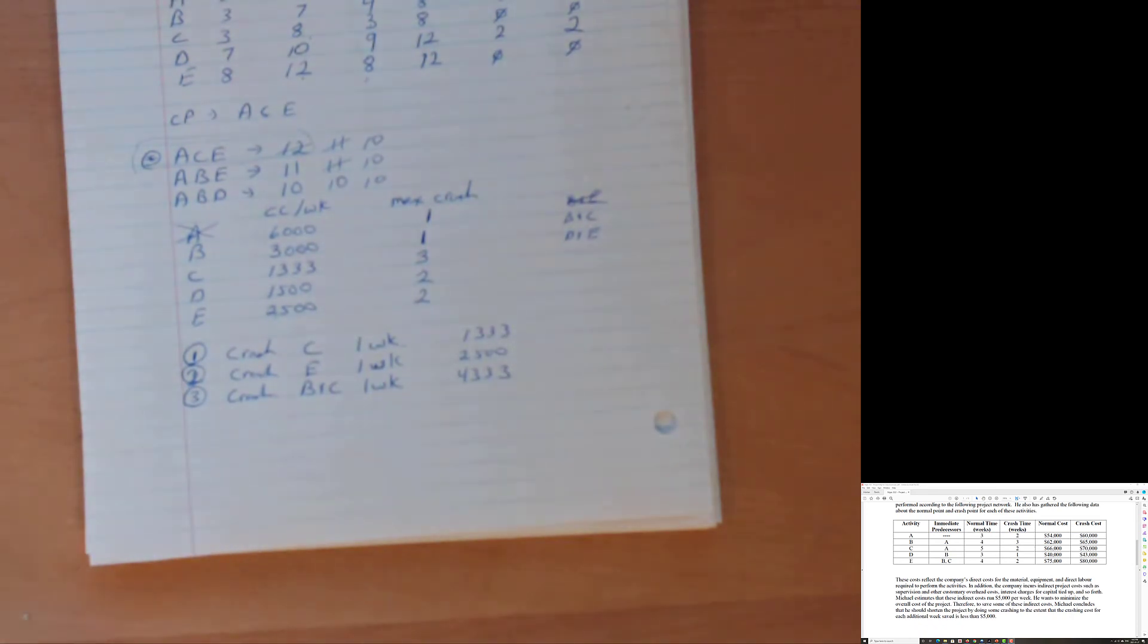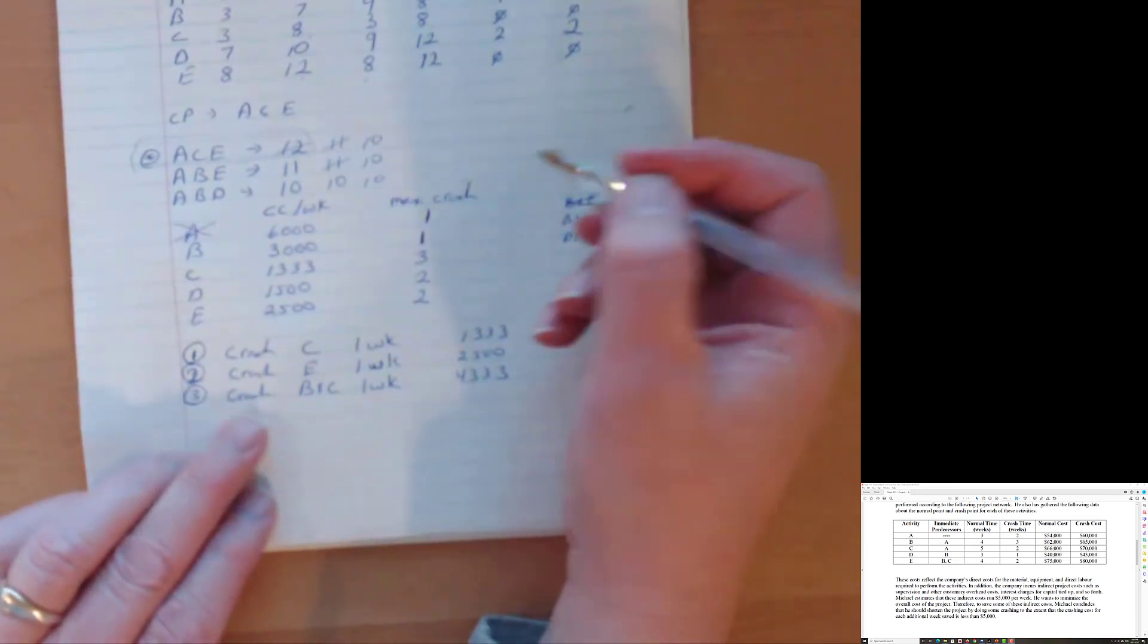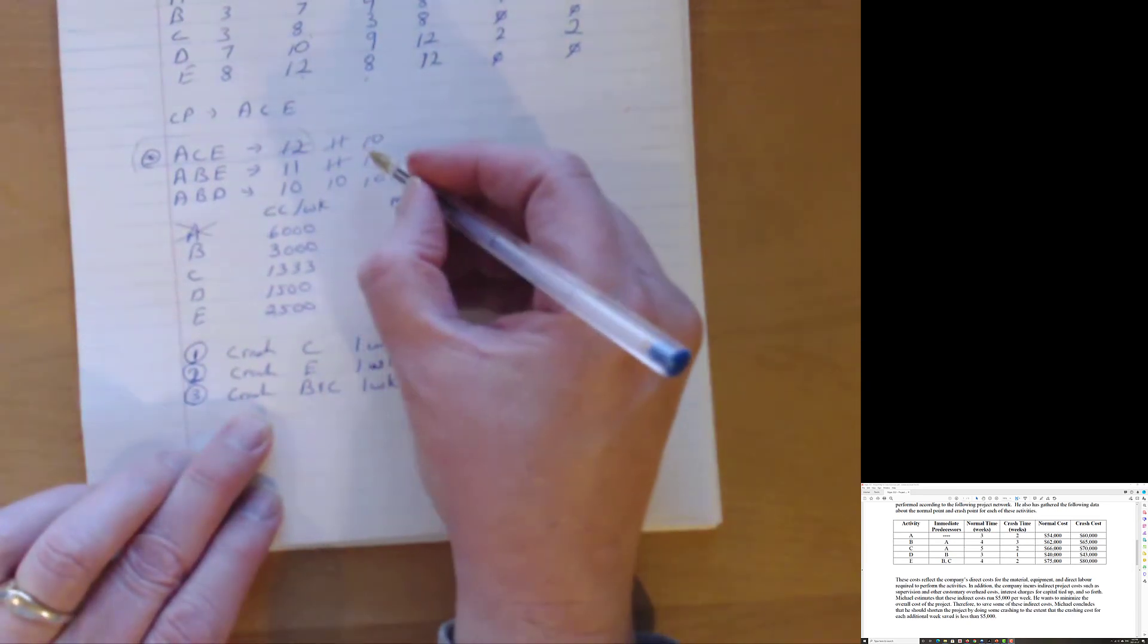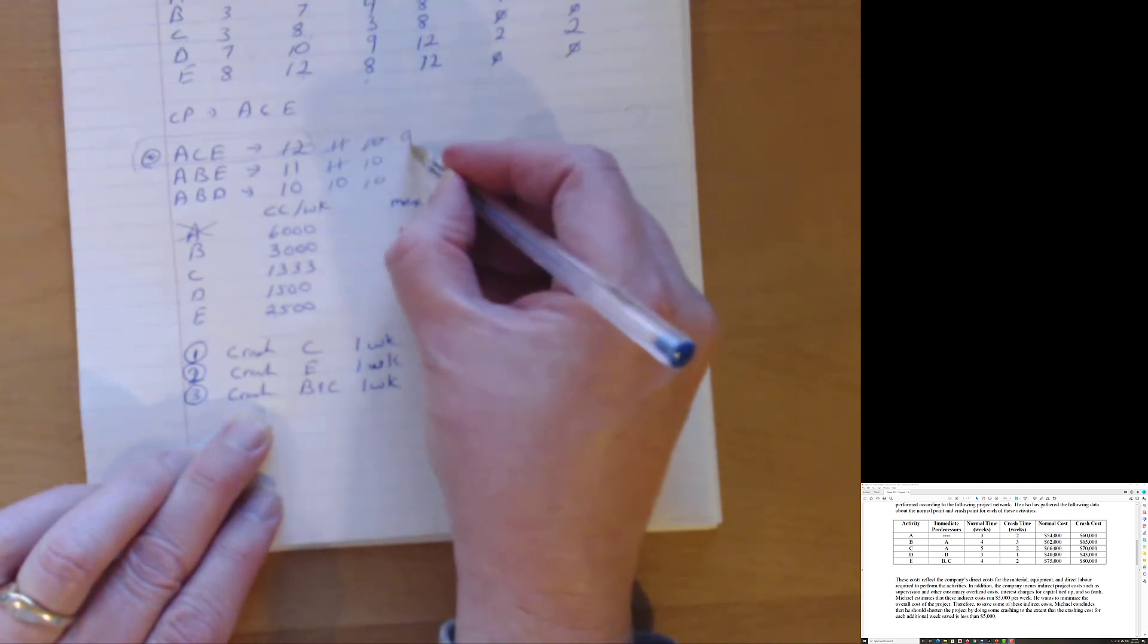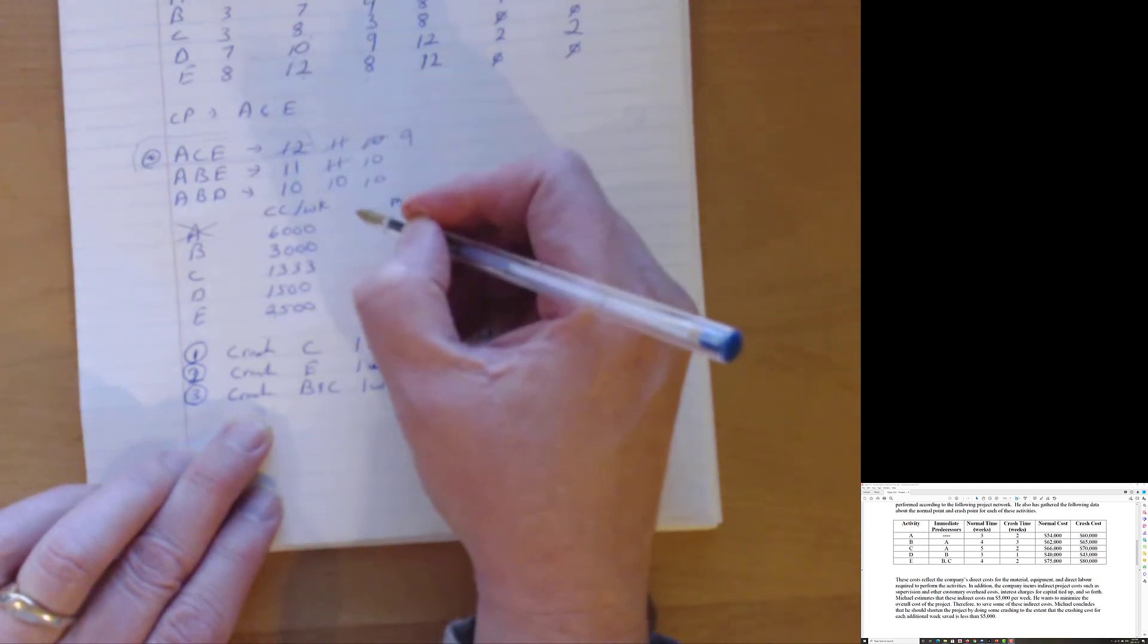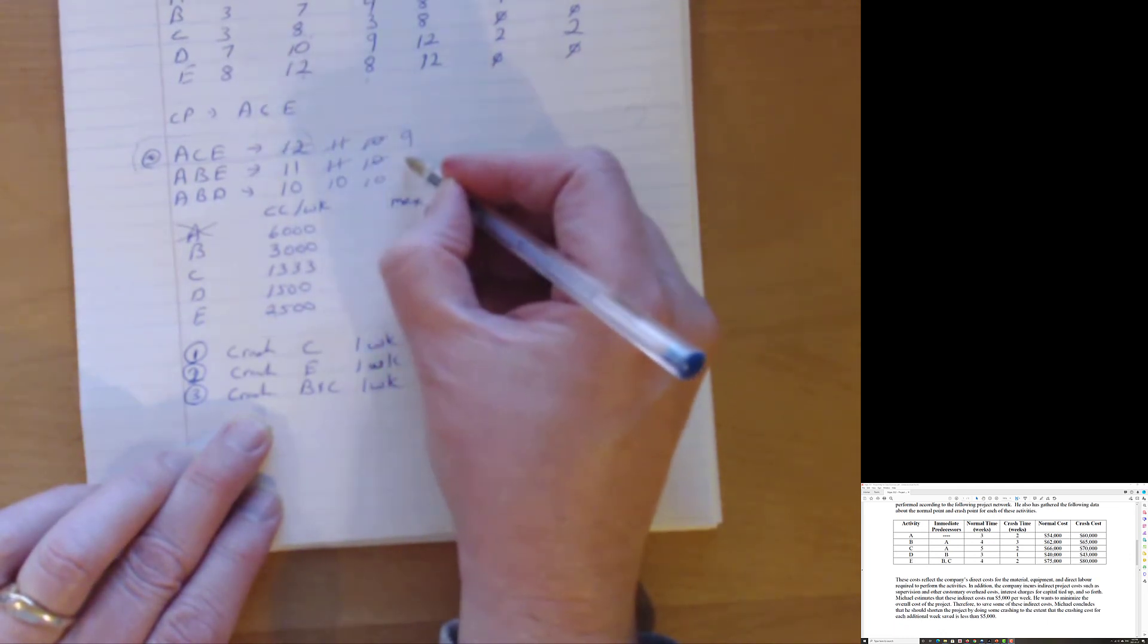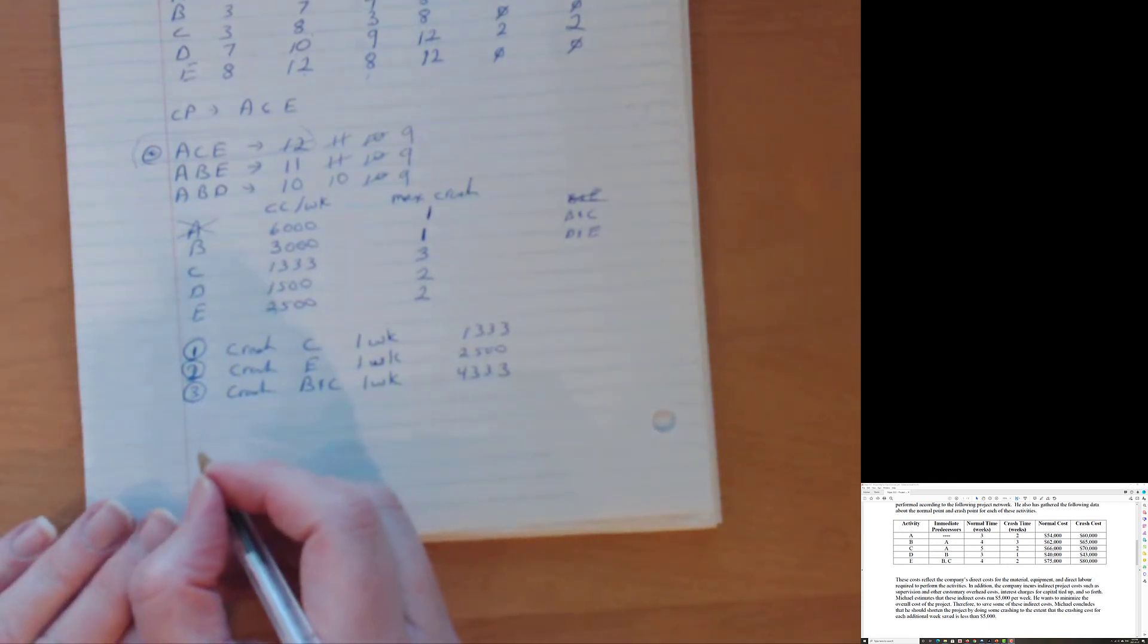Now, what does that do? Well, that takes my B and C. So that goes down to nine. B and that's the B. So that goes down to nine. And this one has a B. That goes down to nine. But I still have three critical paths. Can I do more? Let's check it out.